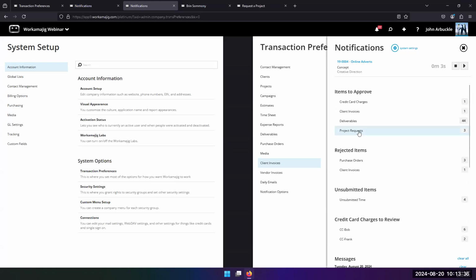All right. So then also within the project, once I'm working on it and I need changes, again, I can put in these change requests, which again have a certain workflow to them that you define, to determine who this needs to go to, who gets the approval. Once it's approved, then that last person is probably going to be the account manager or project manager, who can then review those and change things as needed, right? Do I need a new estimate? Do I need new orders out there? Do I need to assign more people, take people away, whatever that is? Okay. All right.